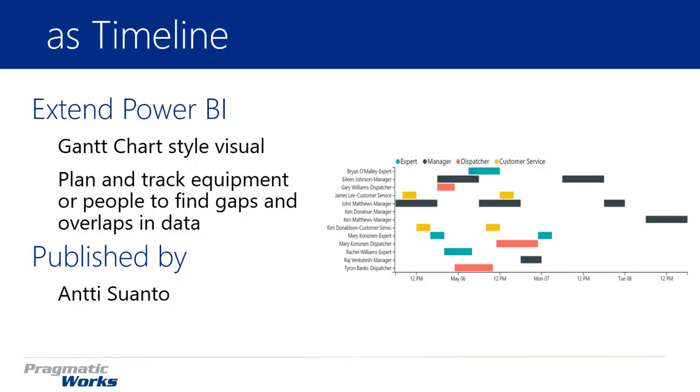The As Timeline visual is really a Gantt chart. So if you've worked with Gantt charts, you likely have the idea of how this works. The purpose of the As Timeline is to plan or track equipment or people, or anything else that you want to track. It gives you the ability to visualize a start and end date on a single visual and see if there's any gaps or overlaps that might cause issues.